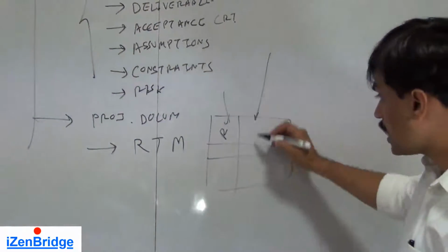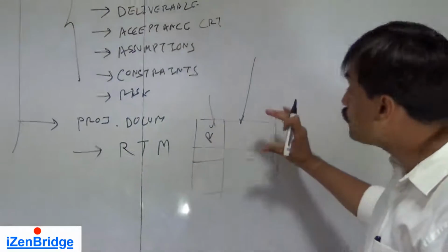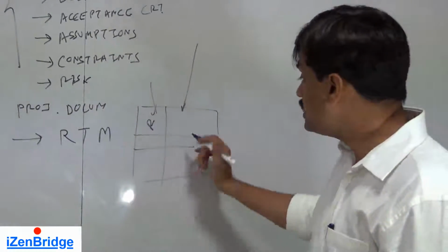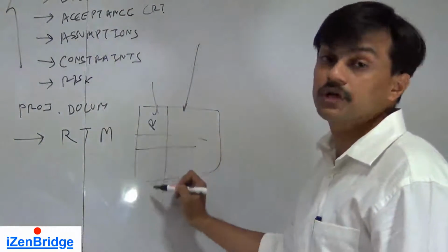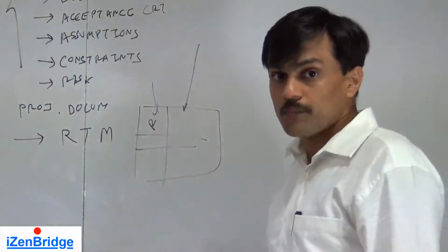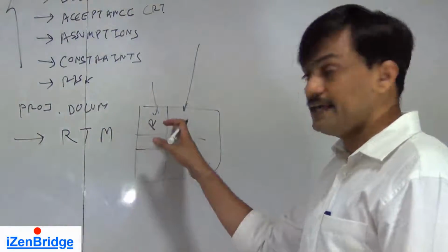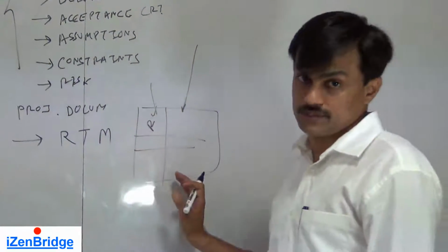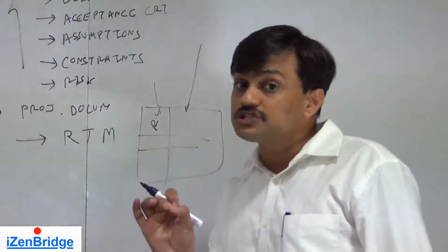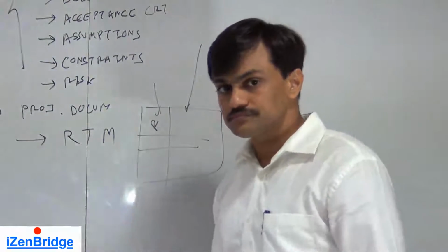Now here we need to tell which section, which particular deliverable of your scope statement, is catering to this particular requirement. Ideally, at the end of the define scope process, we should have a mapping of requirements against the planned deliverables. We will tell that this particular screen will take care of your search need.